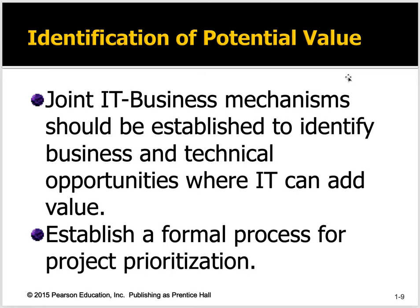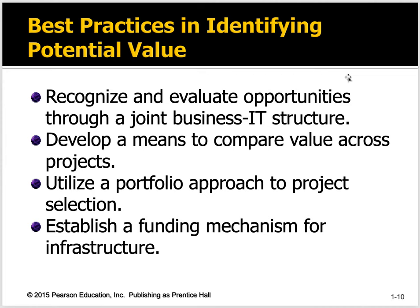You want to establish a formal business process for project prioritization. Even if you have SAP or Oracle, you're always tweaking it, always adding functionality like quality management or warehouse management — things we added after implementing SAP at a company I worked at. It's almost like a capital budget, but it's an IT budget, run almost parallel to the capital budget. Do we need a new building, a new warehouse, a new factory? What are the priorities? You judge them by which ones yield the most value to the company in the shortest amount of time. The same thing applies to IT.